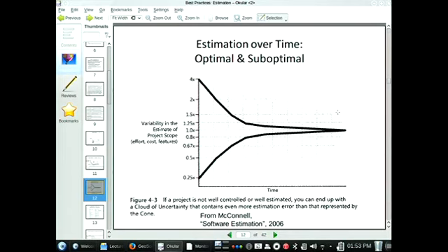But the point is that the uncertainties are biggest early on, but your capacity to change things, your leverage, is greatest early on as well. Later on, you have more and more uncertainty about how quickly it will finish up, but you also have less and less ability to change it. It's like you're on a bike going downhill, at faster and faster speeds. You have less ability to steer, but you have greater and greater clarity about what awaits you at the bottom of the slope.